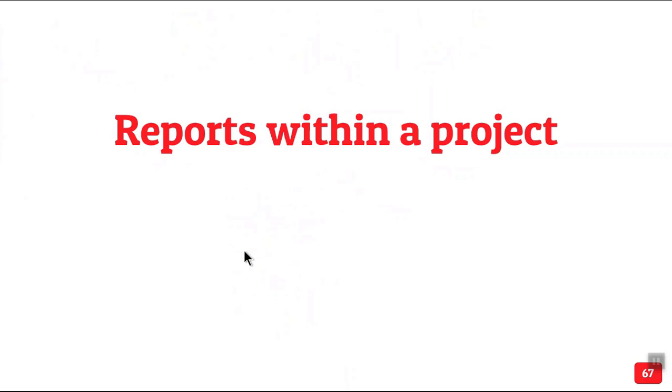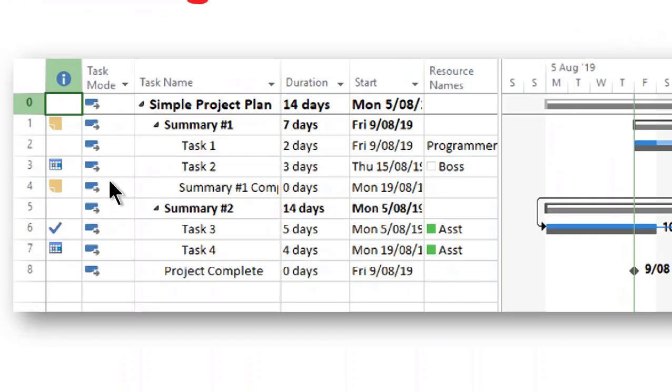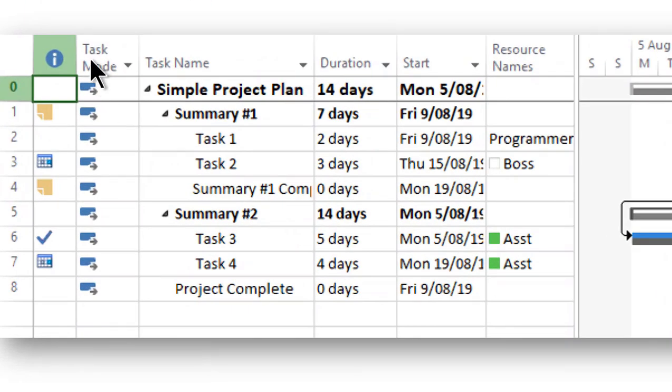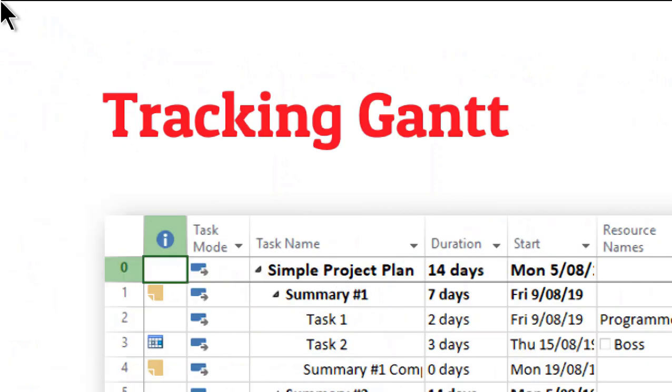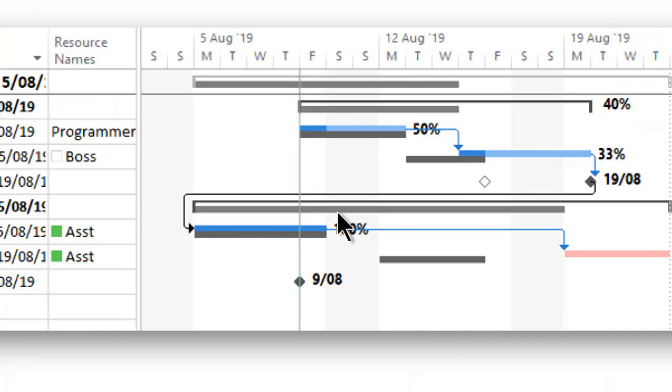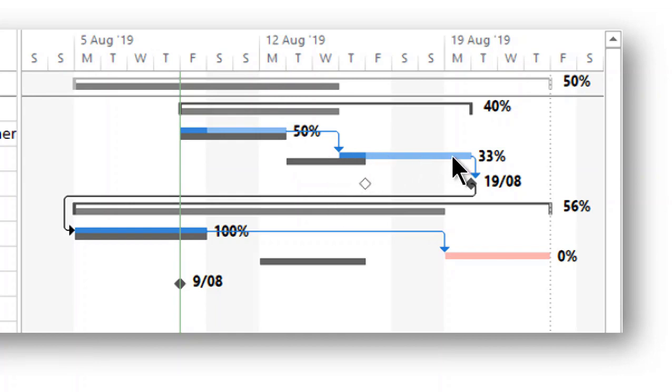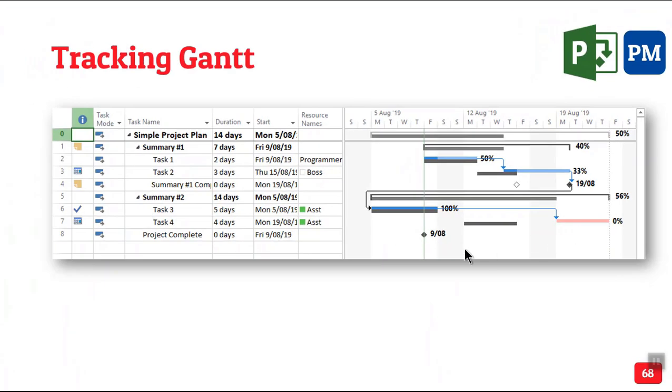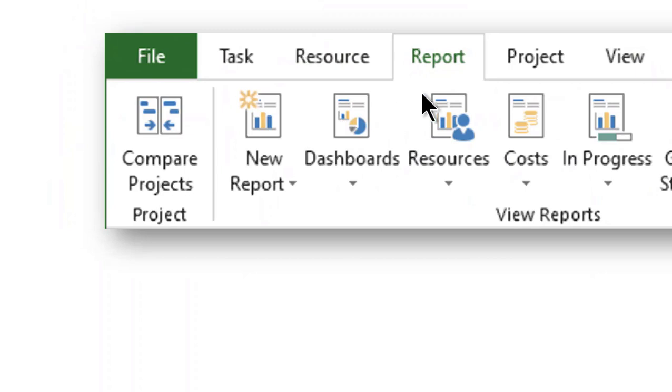Now all this was enterprise reporting. Enterprise means all reports across projects. But still, complex projects require project-specific reporting as well, which is not available on Project Online. That happens inside Project. Now the simplest thing we do is, I have saved a baseline and now the project is progressing. So this is called tracking Gantt, which is a brilliant feature for any project management tool. What does it do? The gray one shows you what is planned and the red one or blue one shows you what is real. So this was planned to happen on Tuesday. It got postponed and its duration has increased. And it is 33% complete. Red color means it's a critical task. If this task is delayed, project may get delayed.